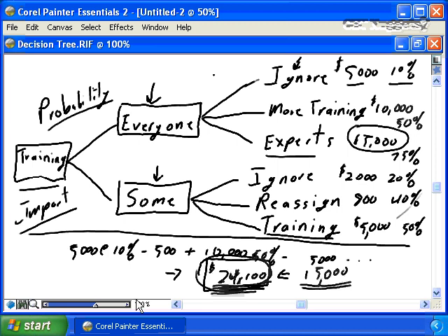But the risk is, if you are overly conservative, overly pessimistic in determining what your appropriate risk allowances should be, you're going to overprice the project, and the project is not going to be approved, and therefore the business itself is going to suffer because there was a valid justification for the project.